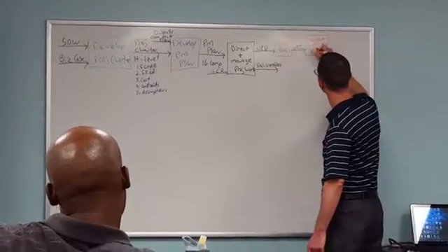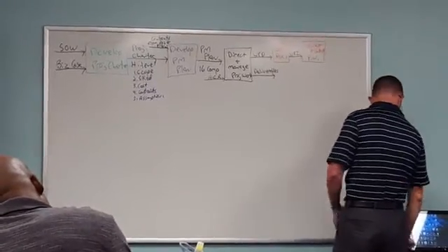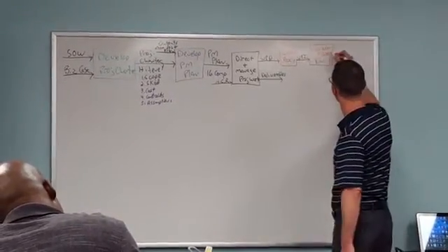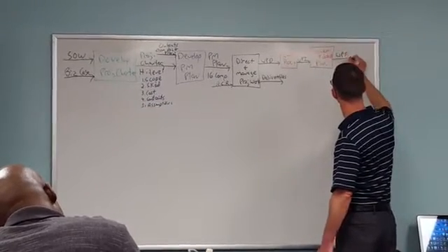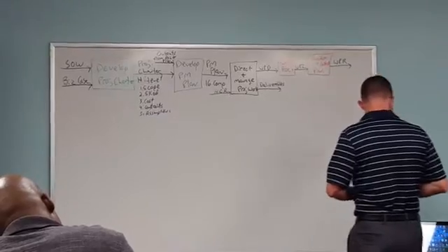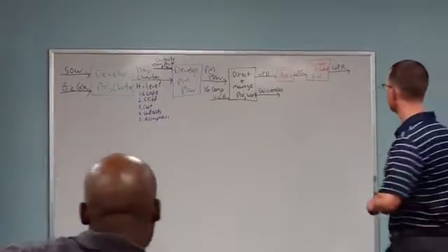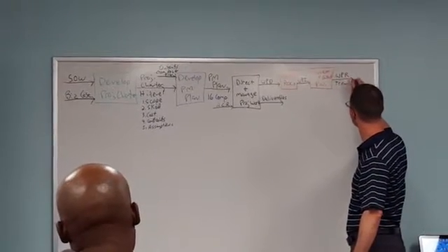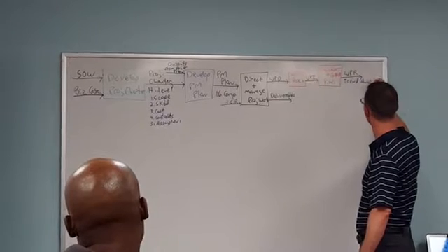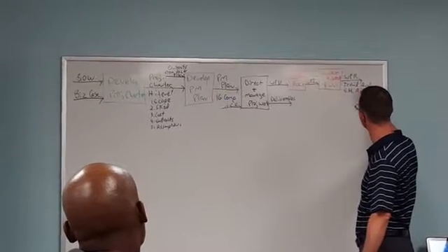Okay, and what do we do with the work performance information there? What does it turn into? Work performance report. There you go. So it turns into work performance report. Very good. And what are the two things that I use work performance reports for? Trend analysis. Very good. So trend analysis, stakeholder awareness. Very good. And stakeholder awareness.